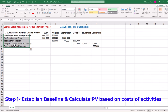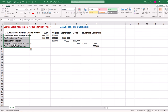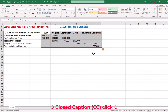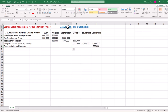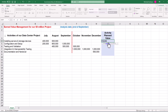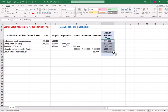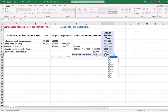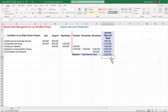Step one is to establish project baseline and calculate planned value based on budgeted costs of activities. Let's start by analyzing the provided spreadsheet accounting for five project activities, starting with installing servers and storage devices and ending with documentation and handover of the data center. Project activities start in July and will be completed by the end of December. We are three months into the project and our analysis date for EVA is at the end of September. We establish the project baseline by finding activity planned values or PV. Click on the relevant cell, press the equal sign, then use the SUM function to add up monthly costs. The formula is then duplicated for all project activities. We can quickly find the project baseline or total planned value of 8 million dollars by adding up activity PVs. This concludes the first step in project earned value management using Excel.